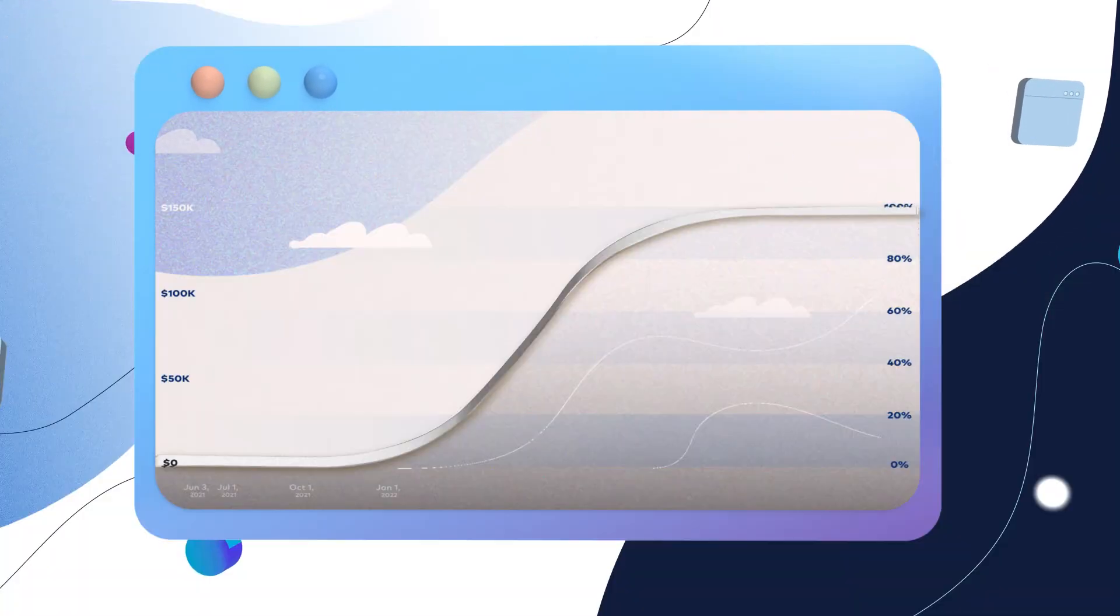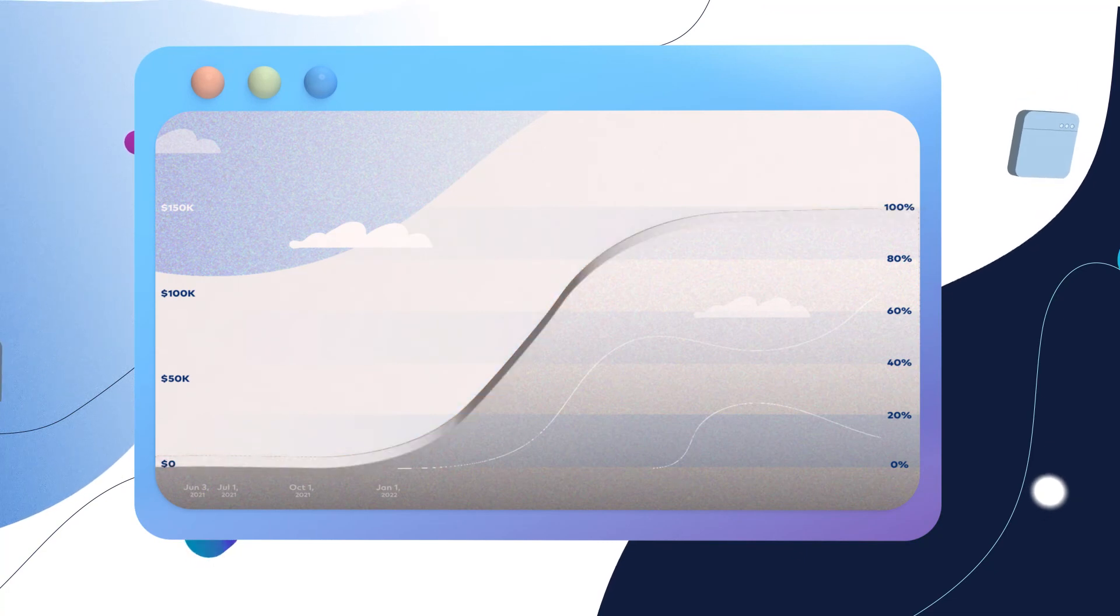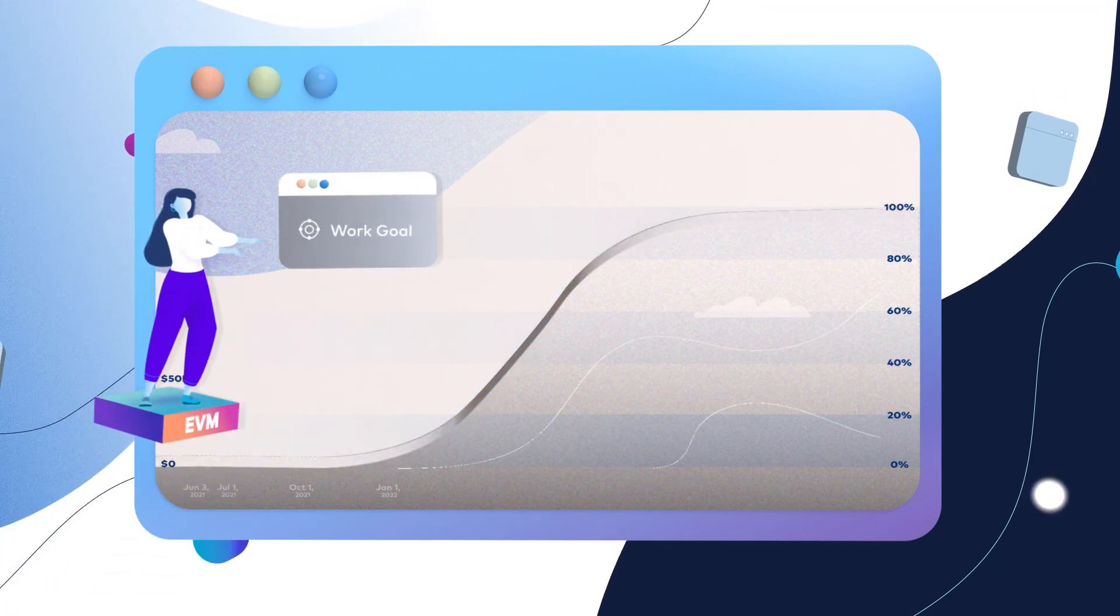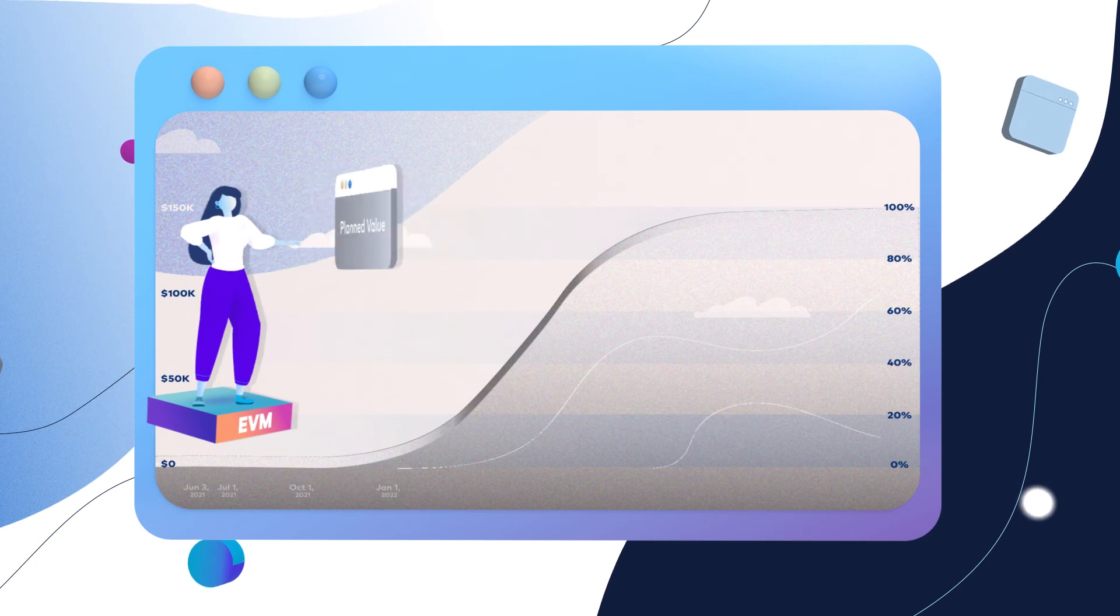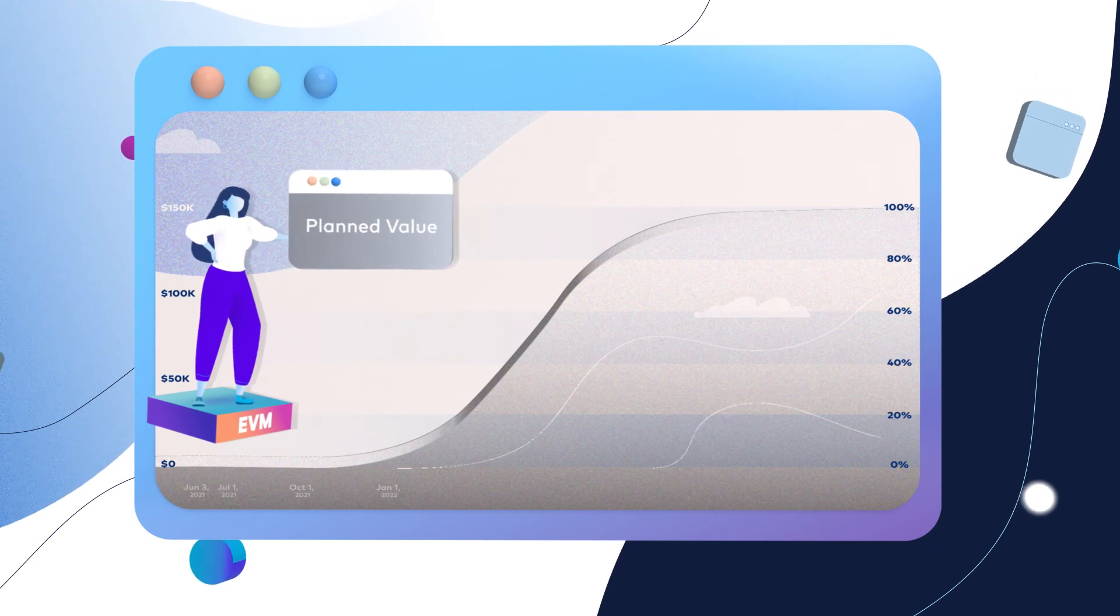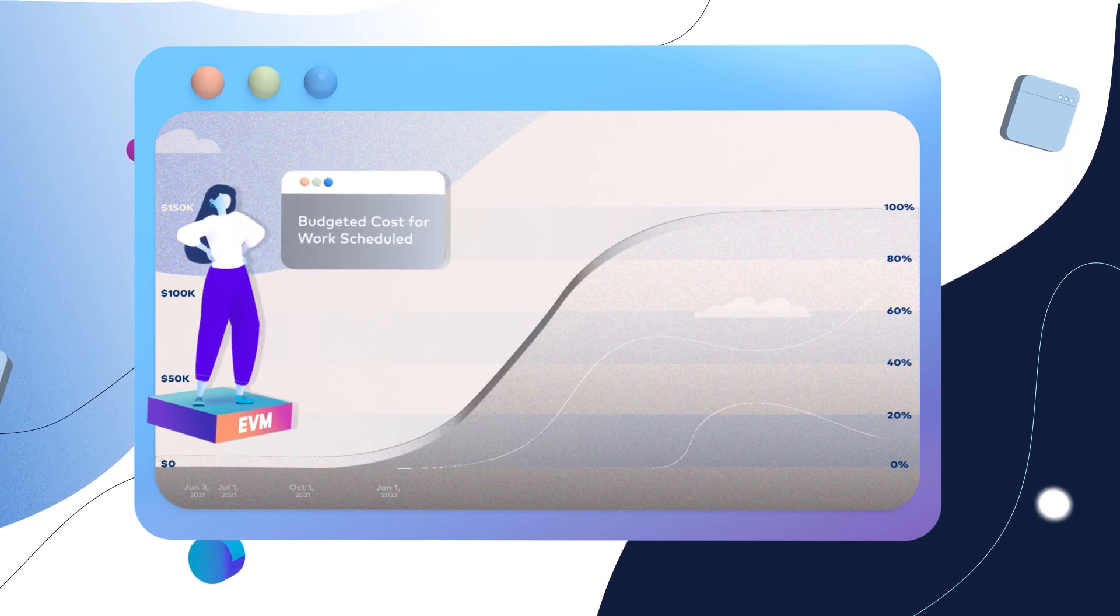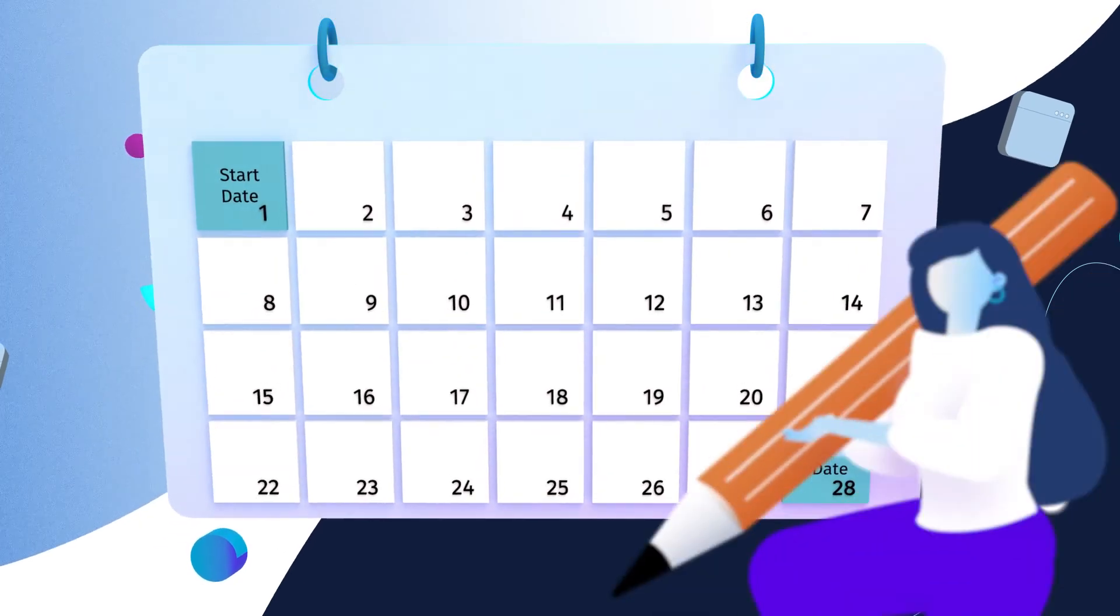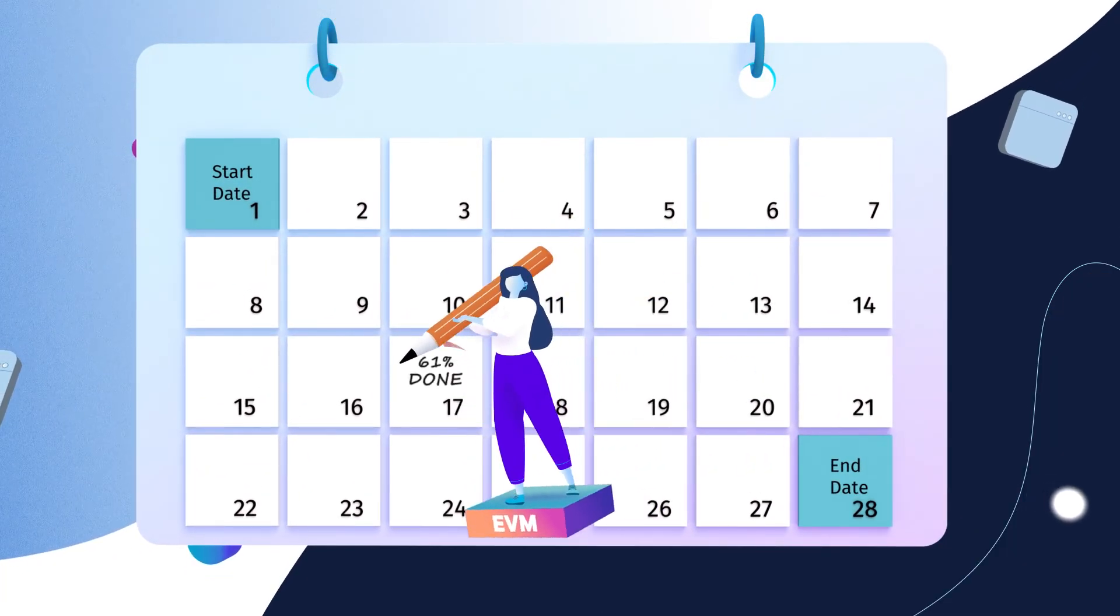Let's start with the work goal line. In official EVM terminology, the work goal line is either called planned value or budgeted cost for work scheduled. Put simply, it represents the percent of your project you want to finish over time.